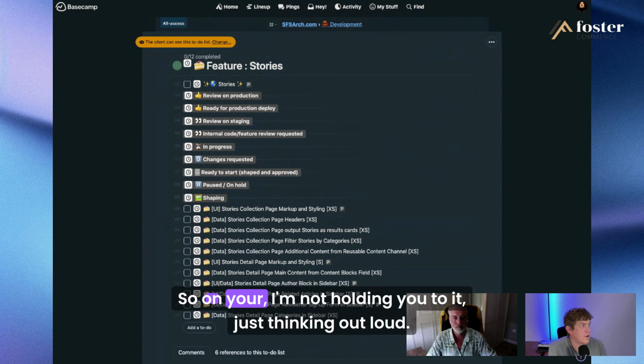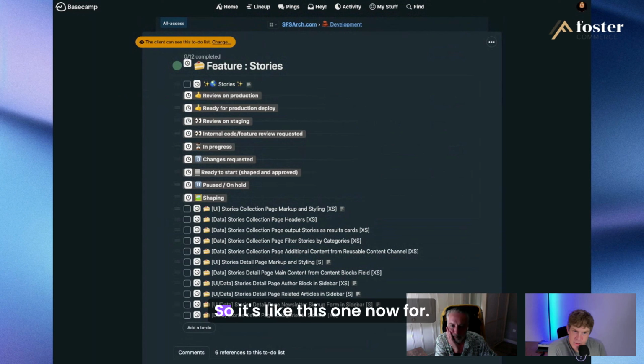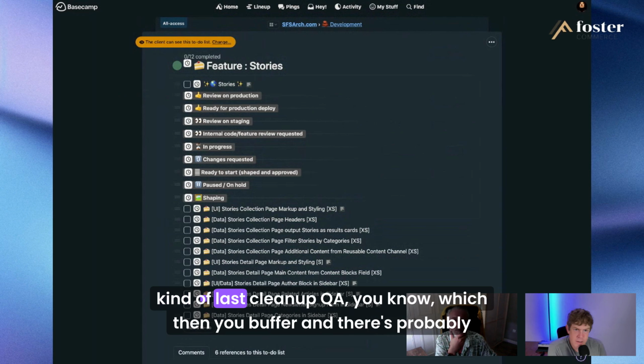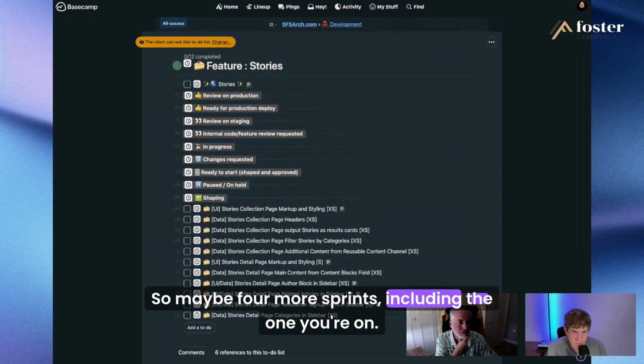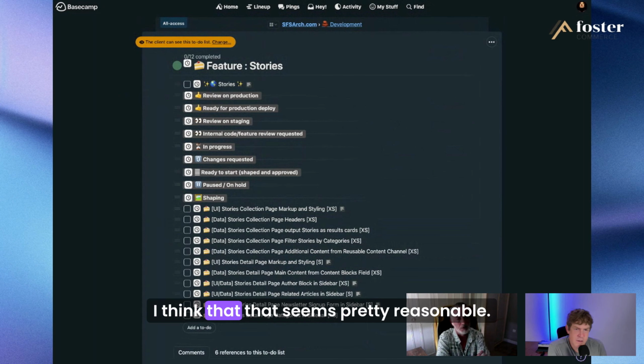Cool. I'm not holding you to it, just thinking out loud. In your estimation, it sounds like maybe 3 more sprints. This one now for wrapping this up, another one for stories, and then maybe one more for last cleanup and QA. Then you buffer, and there's probably always another one. So maybe 4 more sprints, including the one you're on. I think that seems pretty reasonable.